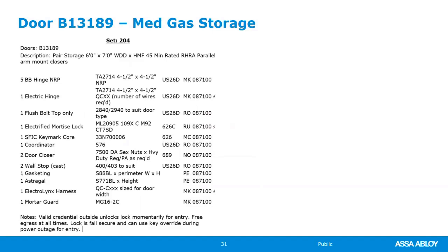But normally I would use a soffit mounted coordinator. This was a last minute change, so it was a change order cost change to the owner. But they chose to be more restrictive than even what the code says, just to be safe. This hospital is going to be around for 60, 70 years. They didn't want a future inspector to come in and say, nope, we're going to write you up, and then have them change it out at some point in the future. So this was an owner decision, even above what the code says. We'll take a look at this opening.